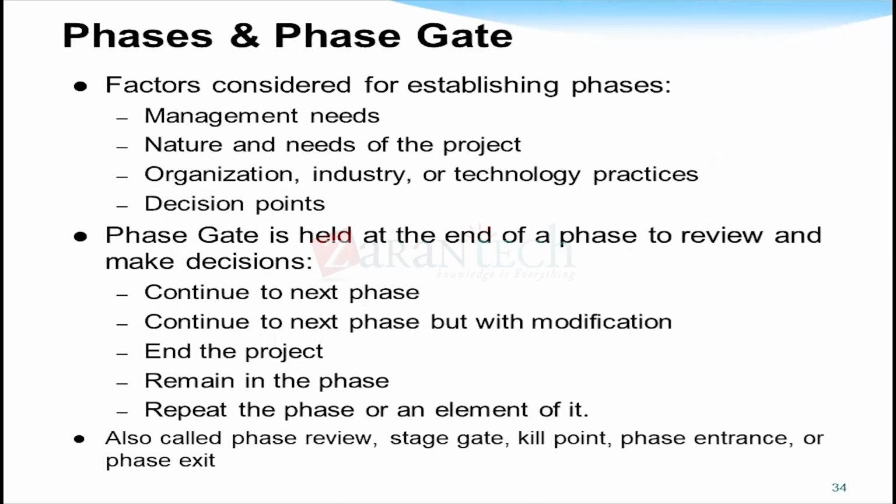And we have different phases or gates. Factors considered in establishing the phases are management needs, the nature and need of the project, organization, industry, decision points, all this. Right? Management says, like, there will be funding, say up till requirements they have some funds, after development they have some funds, after deployment they have some funds. Therefore, as per the management, you are defining these phases or milestones or gates. Right? Depending on company to company.